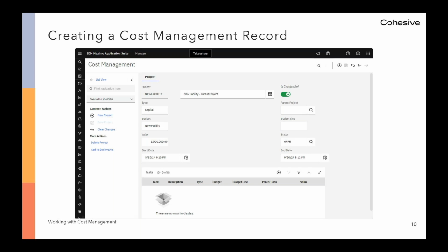The start and end date, when set, are important. In addition to the status, out of the box, the system date must be on or between the project start and end date for the project to be available to select from the lookup on the work order. If the start and end date are null and the project is at approved status, the select value for the project ID on the work order will show the project as selectable regardless of the system date. We'll discuss the task fields next after a discussion on the task table. They work similarly to the project fields.